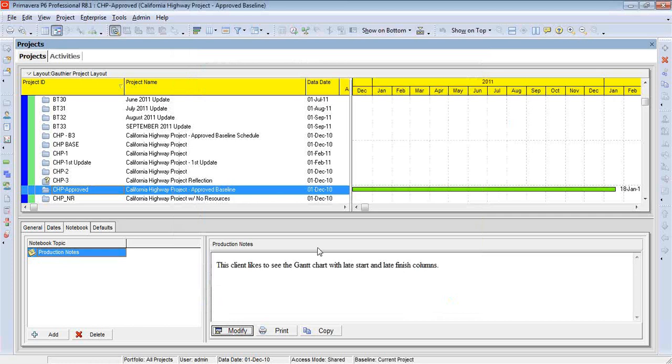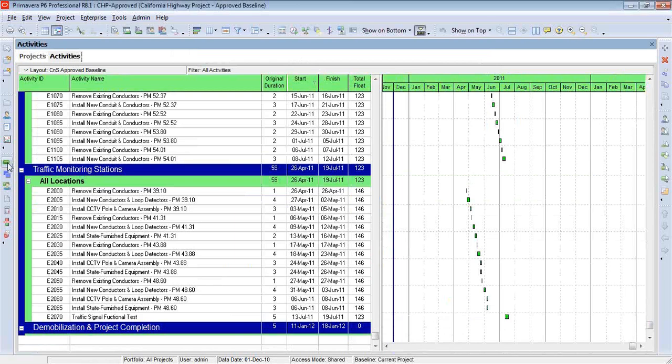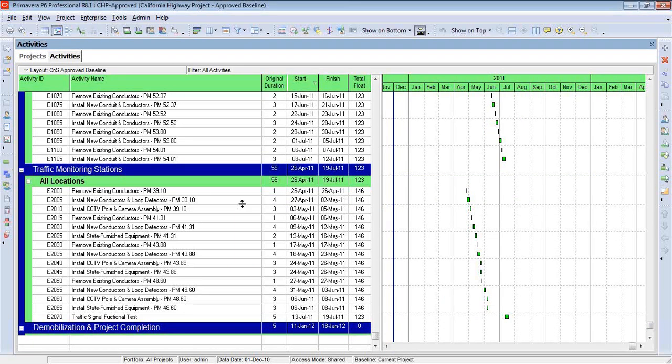Now, the other notebook topic is particular to an activity. So for this same project, I'm going to go inside there. And what we can do for every one of these activities, we can have an individual notebook comment.